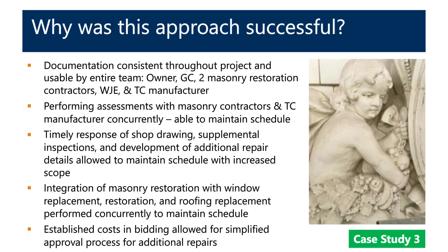terracotta manufacturer. One of the things that was done early on in this process was performing the assessments for that initial terracotta replacement with the masonry contractor, with the terracotta manufacturer, and with the AE. This helped us to maintain schedule, meaning that locations didn't need to be accessed twice. Timely response of the shop drawing and submittal inspections was very important. And then quickly developing any additional repair details allowed to maintain schedule, even with an increased scope.